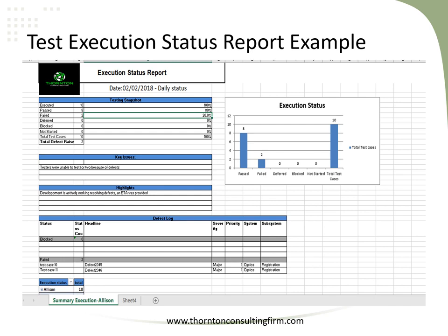In most cases, they're extremely busy and they just don't have time to read through a lot of detailed information. So on the test execution status report, you want to make sure the key information about the testing activity is front and center for the target audience. If testers were down for a few hours because of a problem, you would want to make sure that information is documented here in the key issues section.